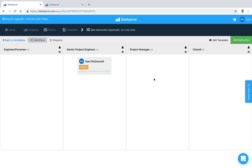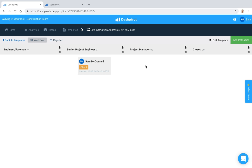The other useful feature inside of the workflow is the ability to set up notifications to get sent to specific people when forms are created or when they move from one column to the next. In this example, we want to notify the project manager after this is signed off by the SPE. Once it moves to this column, we want to notify the project manager via email.